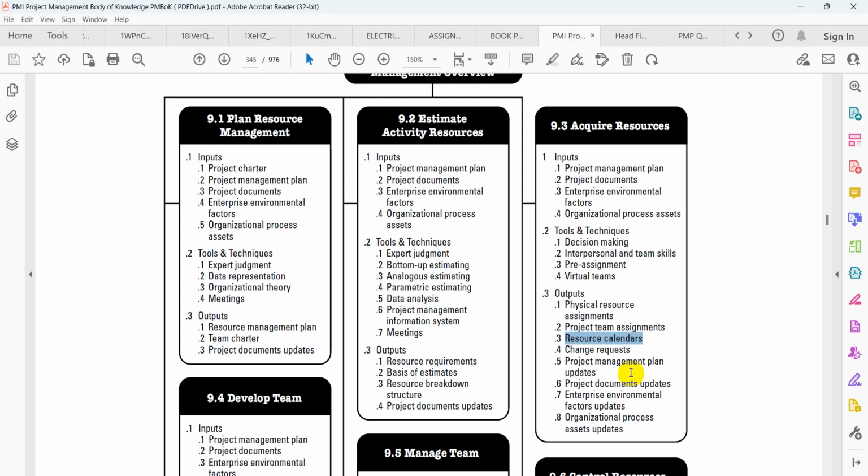When we come to the physical resource calendar, it's now the equipment. You can't just go and hire a machine that you don't know whether it's available or not. You have to look at the calendar because it's been allocated. And also the other problem that I've seen, guys, they will bring people on site before time, and remember, you need to pay those guys sitting there.